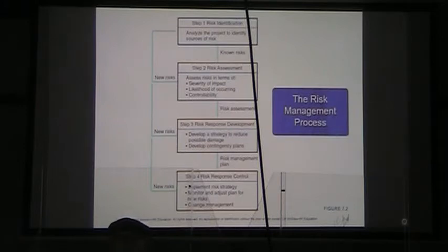For example, under ordinary circumstances, we would not put an asteroid striking our facility as one of our risks, right? The probability is so low that it doesn't seem as though spending time worrying about that would be a useful thing to put in our risk matrix.